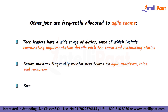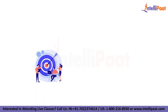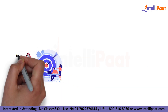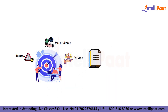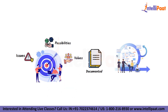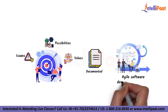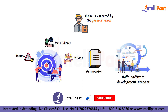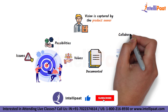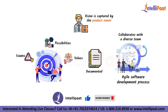Business Analysts partner with the Product Owner. A vision statement outlining the range of issues, possibilities and value to be addressed is always documented as the first step in an Agile software development process. This vision is captured by the Product Owner, who then collaborates with a diverse team or teams to carry it out.